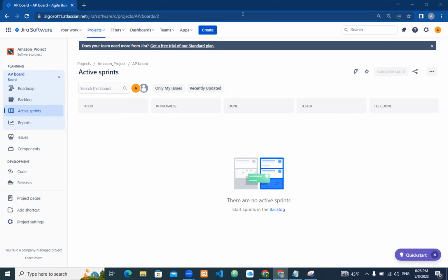Okay, Feroz asked a question: what is the story point numbering? Feroz, the story point numbering means that I'm assigning this user story, the login user story. Suppose I assign the login user story. You're a programmer, and you might have created login functionality in the past, and you know how complex it is and how long it will take to create the login functionality or login feed for a web application. It might take 7 days or it might take 1 day. Its complexity is high or low. According to that, you will assign the number, and this number will be according to the Fibonacci series.